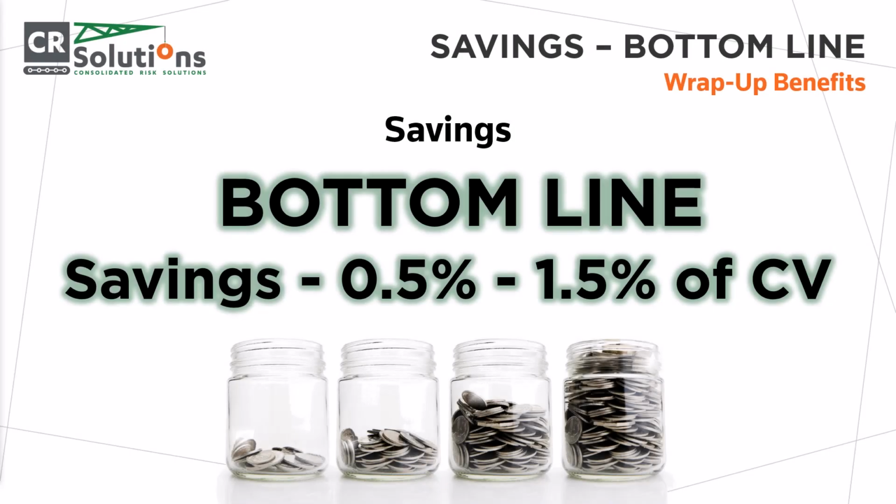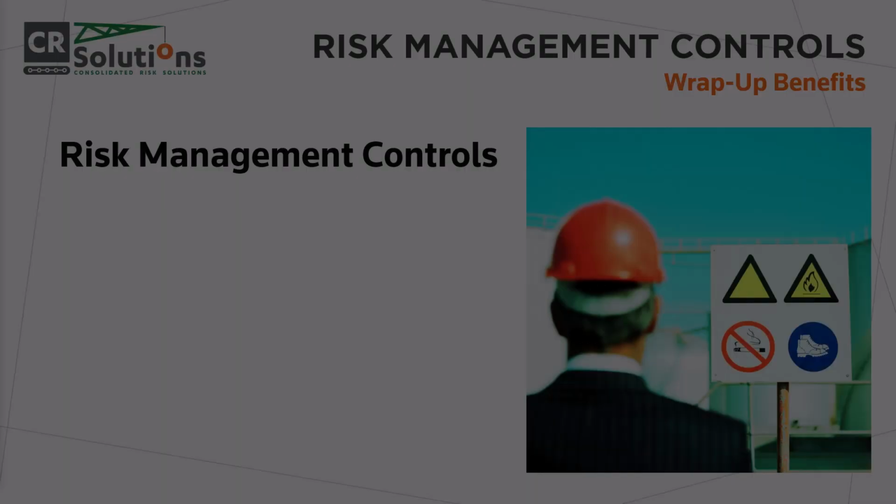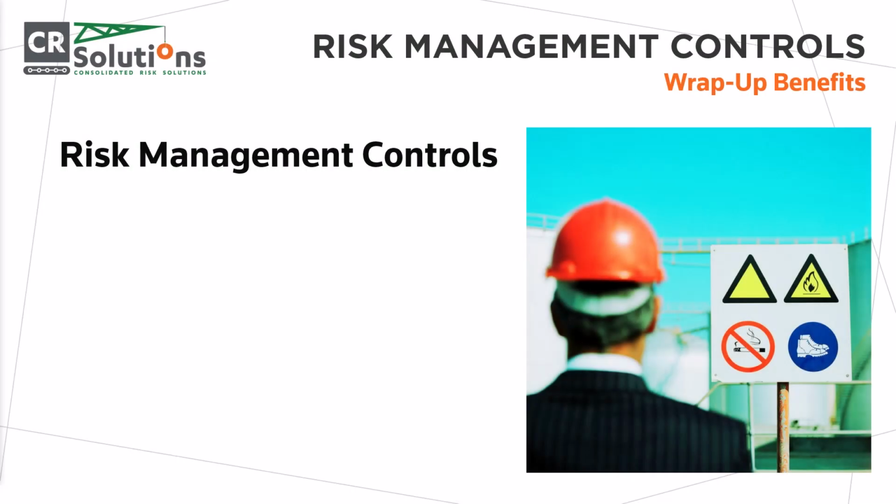Bottom line, how much do wrap-ups save? Usually a wrap-up will save the sponsor around 1% of the total construction value of a project. This may not seem like much. However, if this was a $200 million job, the sponsor could have saved $2 million overall by utilizing a wrap-up insurance program. Along with project cost savings, there are many other benefits of a wrap-up program.